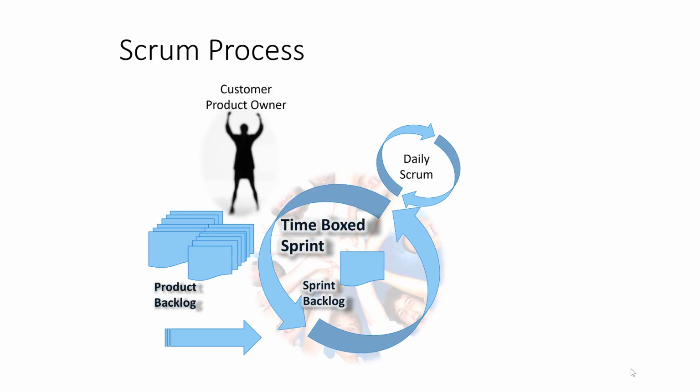They're pulling the work into the sprint backlog. So you have a product backlog and a sprint backlog. Sprint backlog is what they do in the sprint. Product backlog is everything else. Then, I'm going to use a 2-week sprint for sake of argument here, and they have daily scrums. So this is the rhythm that a Scrum team works on, their sprint cycle and the daily Scrum cycle.